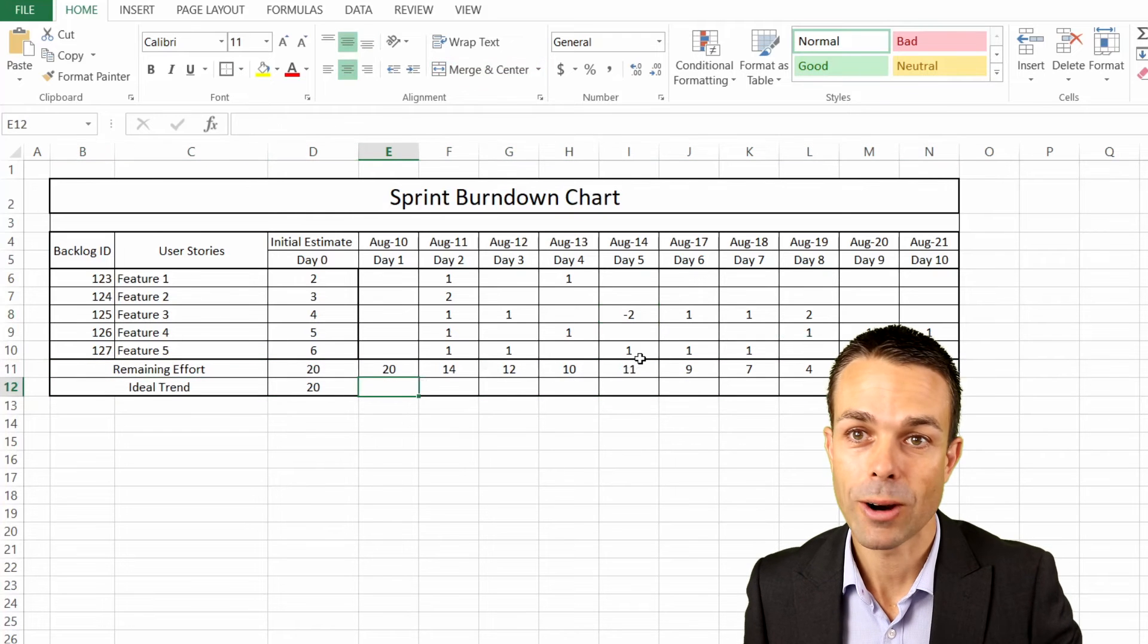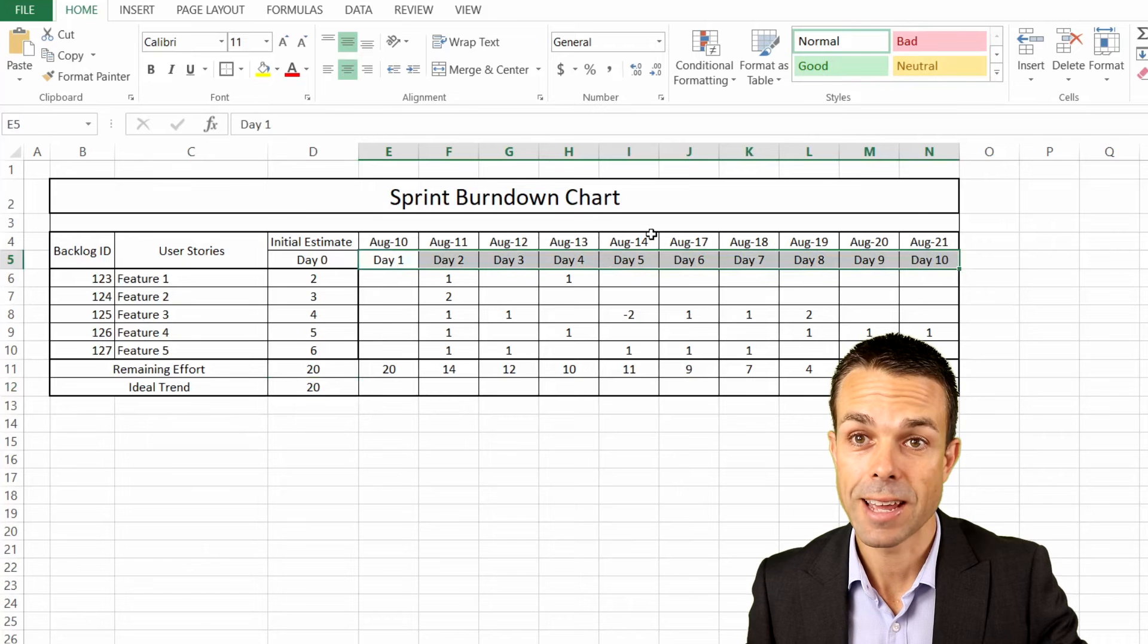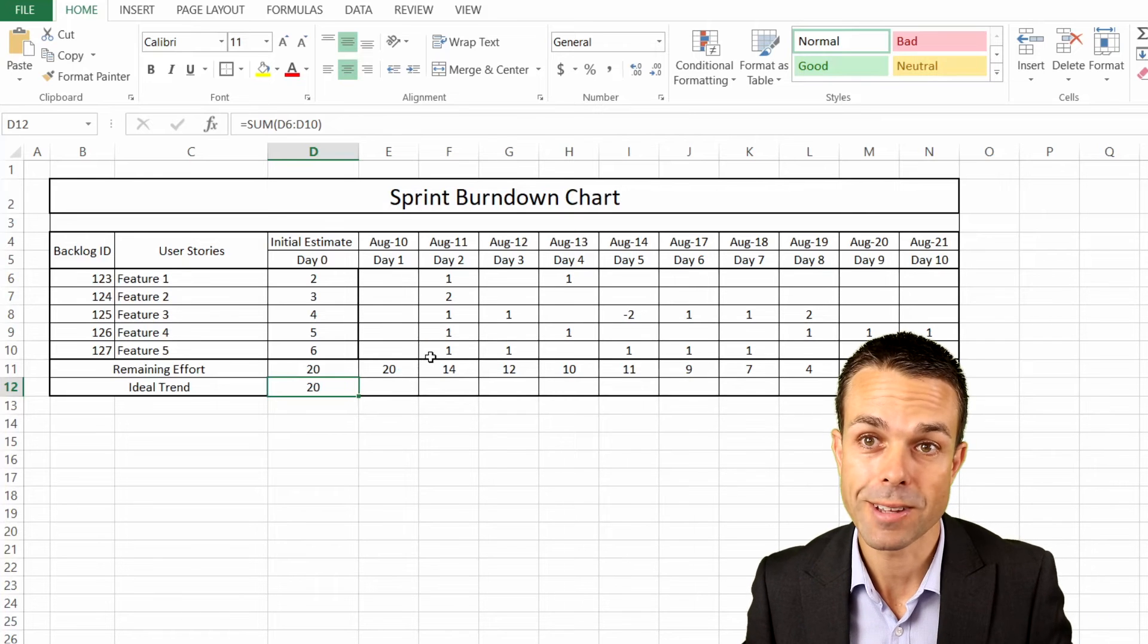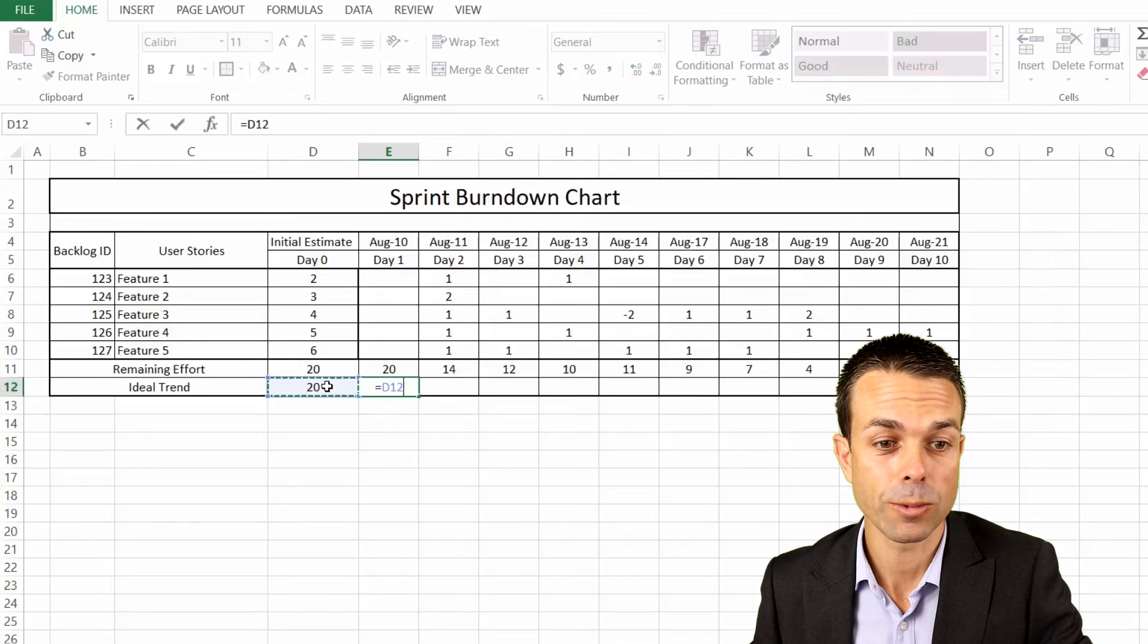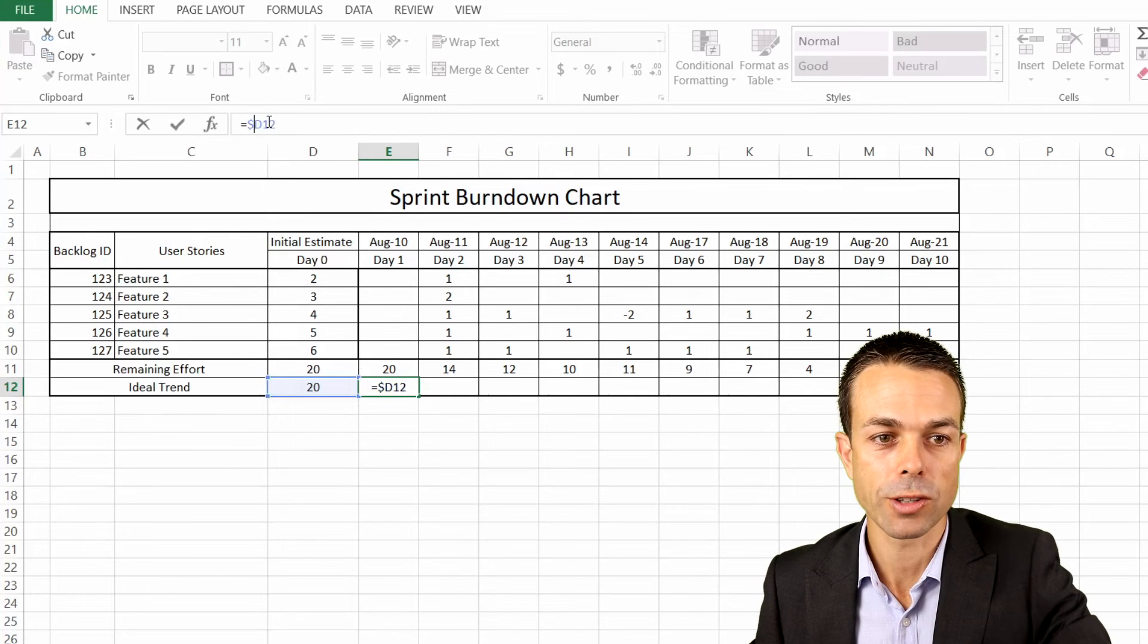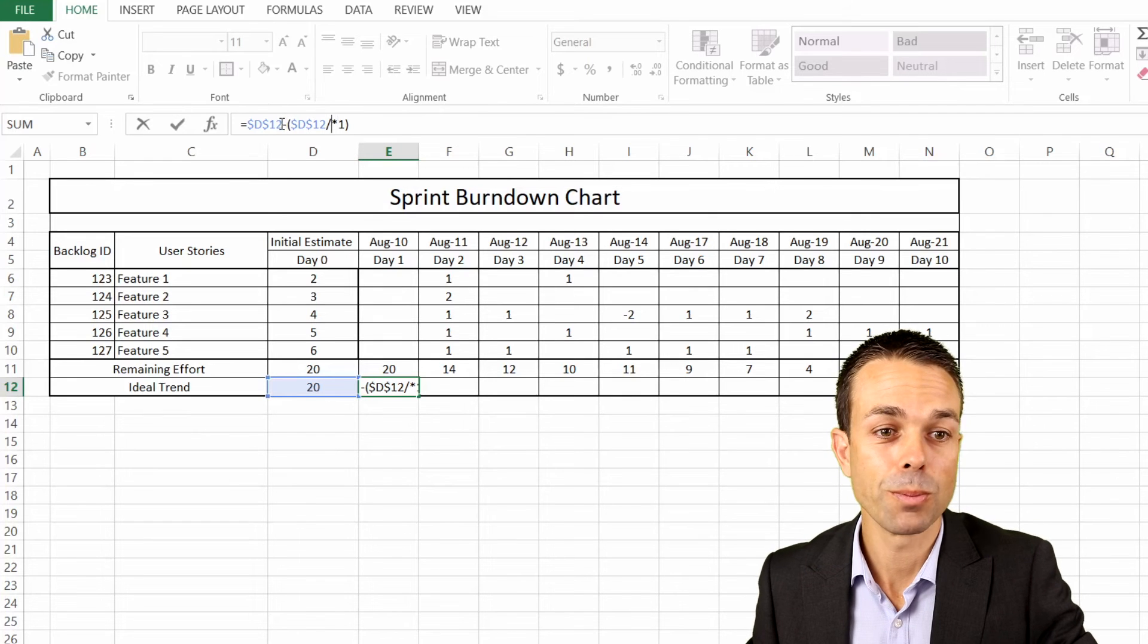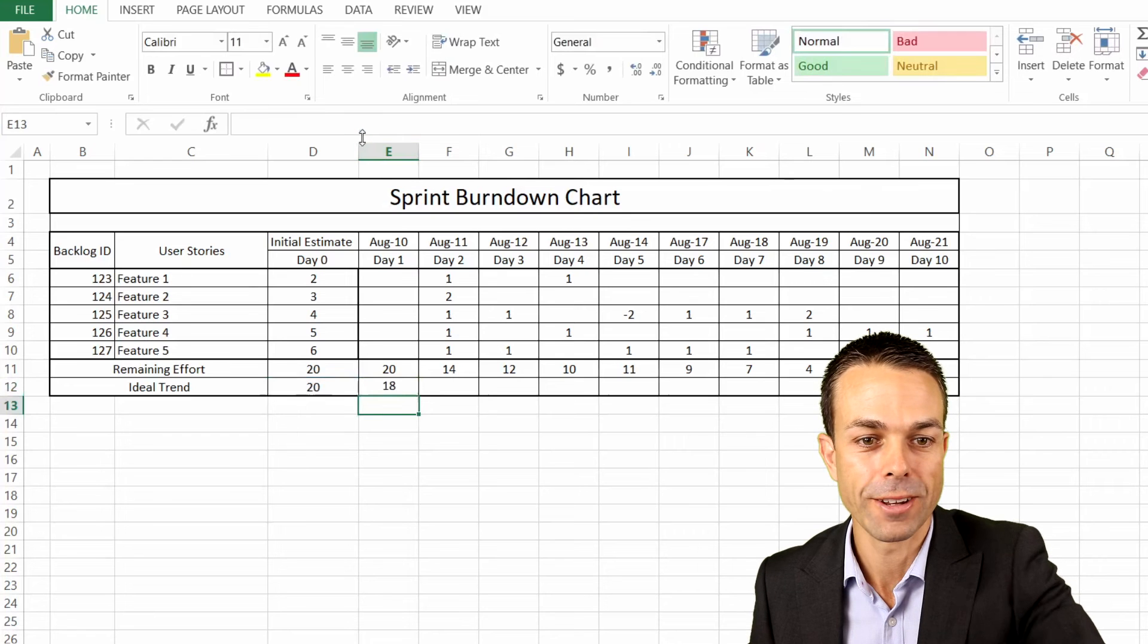Now we want our ideal trend as well. We want to take that 20 and essentially divide it into 10 parts. So there's 10 days in our sprint, and we want each day to take off a portion of that 20, one tenth or 10% of those 20 days. We're wanting to take our total duration, which is this cell here, and we don't want that to change. So we want to put a dollar sign in front of the D and a dollar sign in front of the 12. When we drag or copy this across, that D12 is not going to change. So we're just going to minus D12 divided by 10 multiplied by 1.